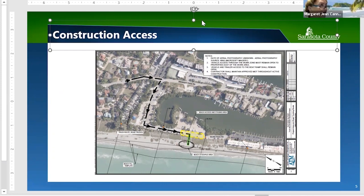Question: How will turtles react to the different sand? The turtles should react fine because when DEP approves sand mines as having beach-compatible sand, one of the biggest characteristics they look at is whether sea turtles can nest in it effectively. DEP will not permit us to use sand that is not from one of their approved sources. Our expectation is that turtles will react well — they've reacted well to sand placed previously.